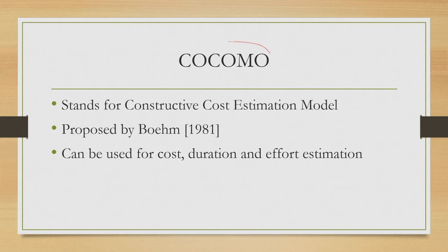There is a very famous model, although very old, that is called COCOMO, which stands for Constructive Cost Estimation Model. This model was developed way back in 1981. It was proposed by Boehm, so about 40 years ago. And this model can be used to estimate the cost of a project. It can also be used to estimate duration and effort required for developing a system along with the cost estimation. So earlier we have seen size estimation. With COCOMO, we can estimate the cost, duration and effort, the other three primary concerns of a project manager.